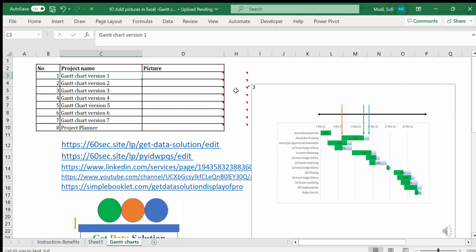For example, for the second activity, shown by the arrow, 80% is the amount completed, and the remaining 20% is the activity that's not completed. So this will generate such a type of Gantt chart.